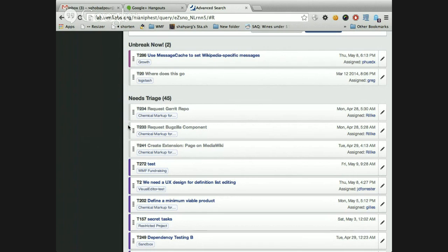Well, yeah. It's not quite at the level of an actual project, but you just want to see, well, 4 of these 5 are done. I understand what you mean. We're making good progress. Just want to see what you would do in that scenario. You would have a parent task, and then you would create subtasks on that. So each individual task would show that a certain other task depends on this one, but then once you go to the parent task, you would see the list of what this task depends on, and you can see which ones have lines through them to see whether or not they've been done.